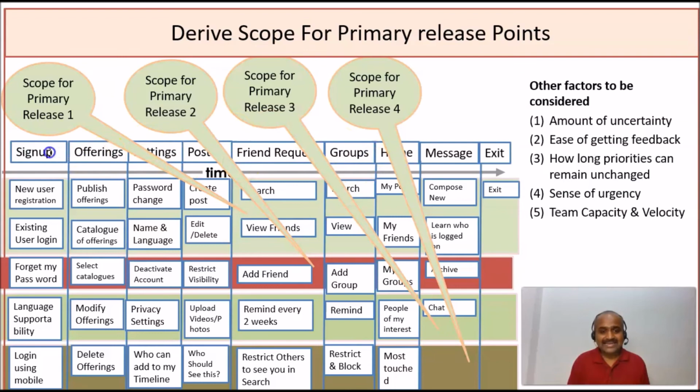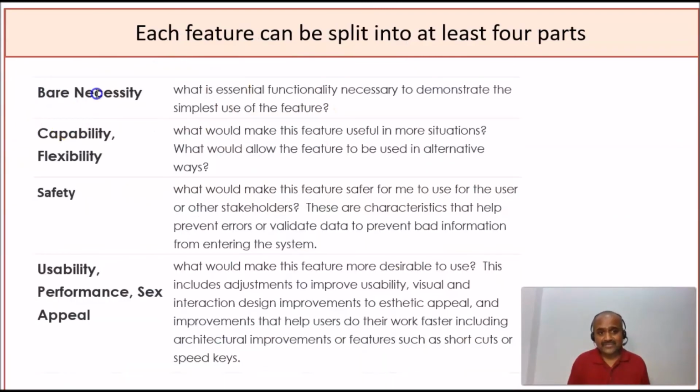Again, walking skeleton is the list of headings, the list of user journeys, the list of broad themes that the customer journeys through. That is what it is. And this particular walking skeleton you arrange from left to right based upon the user influencers or the user champion suggestions, and then you will arrange the related stories based on the paradigm we have written here.